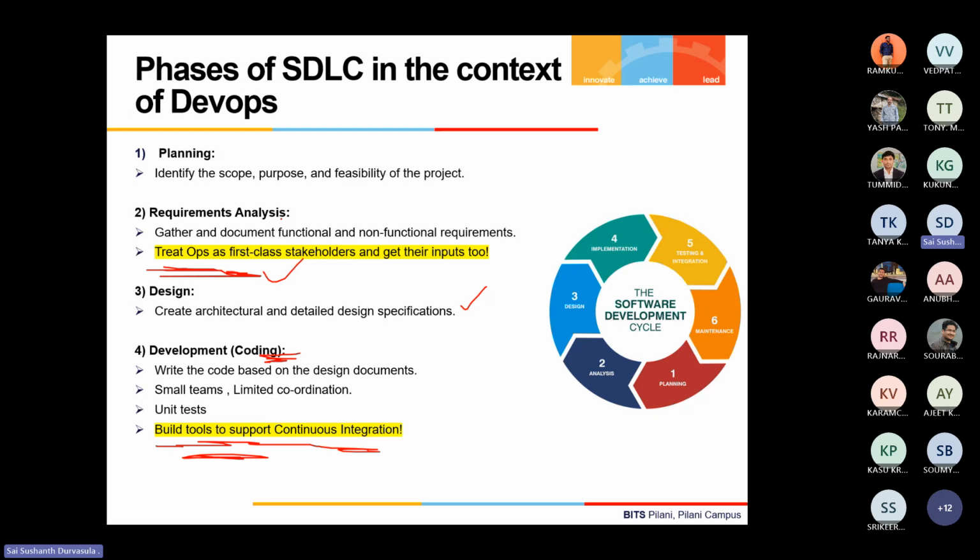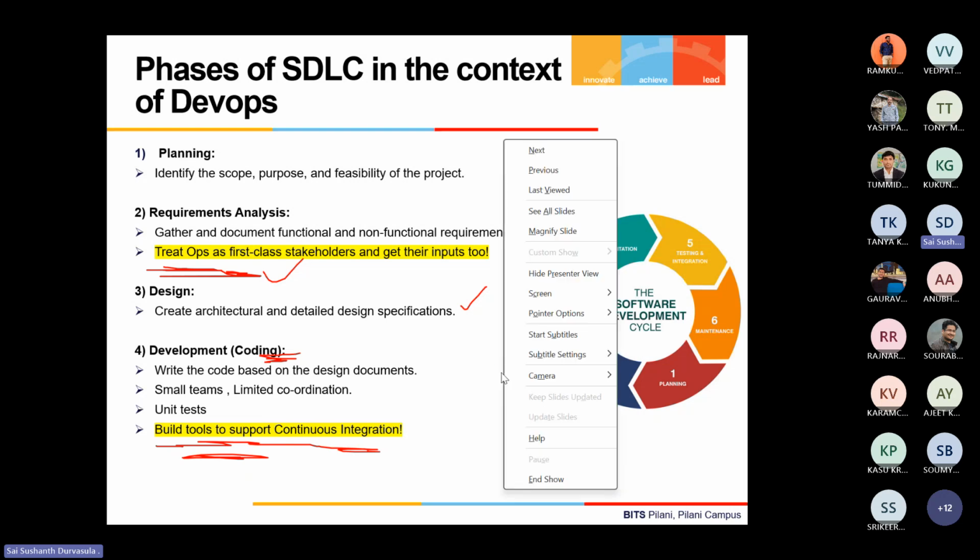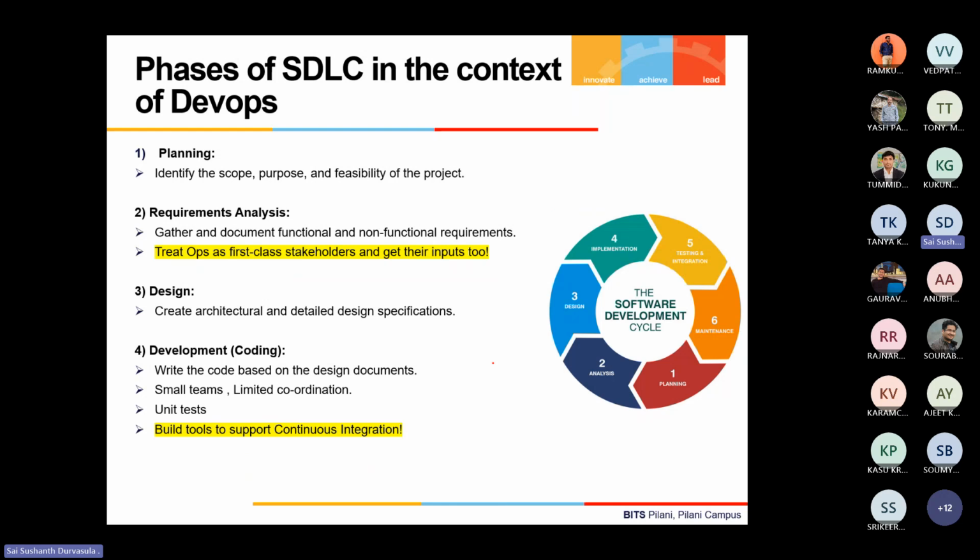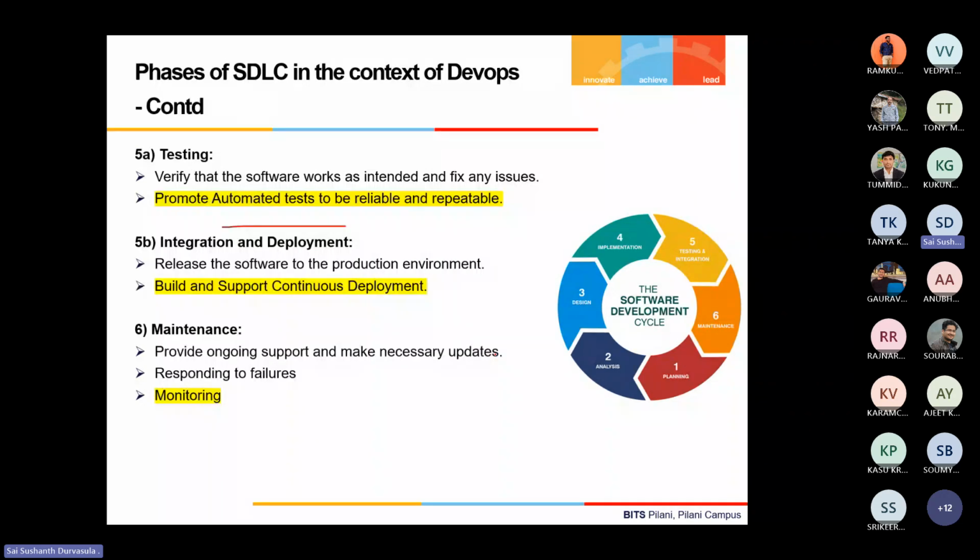As you can see, throughout this SDLC, DevOps also have action items to be done in parallel. That's usually the case where DevOps are integrated. Like I said, most organizations are still not doing this. They only involve DevOps towards the end, where development is done and they have to promote this, and thereby give very little time to DevOps to automate all of these or do better at these. But if you involve them right from the beginning of the SDLC, they would also have sufficient time to come up with the tooling and pipelines to automate this end to end.